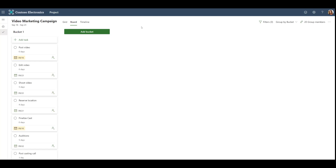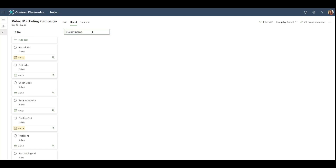Now that we've set up our project, let's check out the board view. The board view is a Kanban view, similar to the view you might already use in Microsoft Planner. We can sort our tasks into buckets, such as To Do, In Progress, Done, and Blocked.